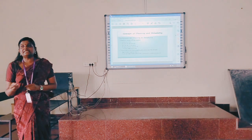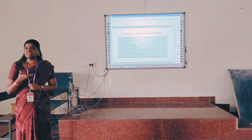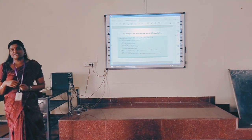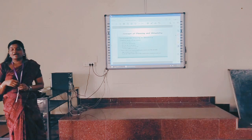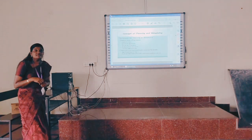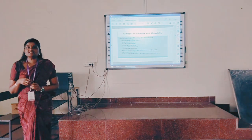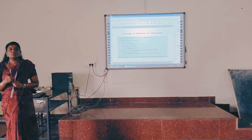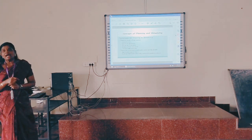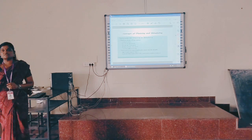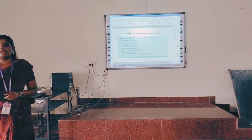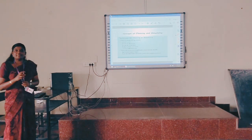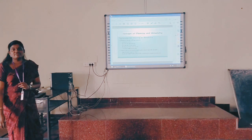Suppose a business project needs that product in four months. Personnel factors matter — how they are working, their experience, their knowledge about that particular project — these are all key points. If you have experienced people, how quickly could they complete the activities in two or three weeks? Based on these things, the schedule needs to be assigned for the activities.